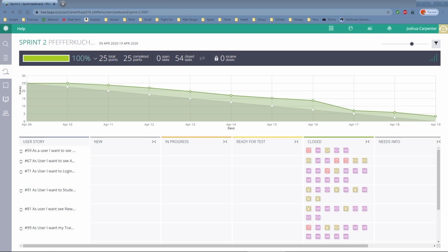I think a part of it, not all of it. I'm sure some of it was just not working as consistently as we could, but overall we worked pretty consistently. A piece of this was also that we had a lot of extra tasks that were not development related. We had tasks for testing and for code reviews and for merge tasks for the Git master, just to keep track of all of that so we're not losing our heads trying to remember where we're at on each task, and it helps keep organizing as well as helps split up the workload. So I think that was a big part of it.